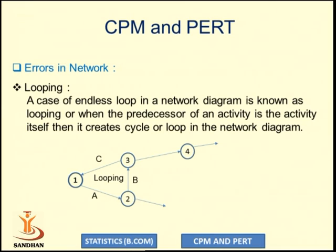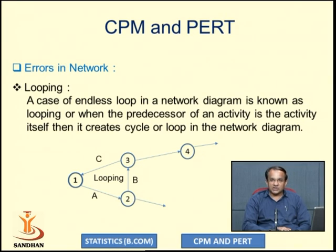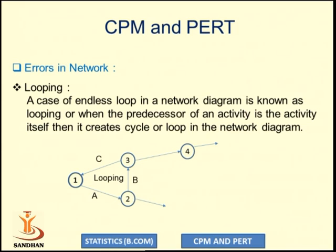While drawing a network diagram, two types of errors can occur. The first error is looping. Looping means a case of an endless loop in a network diagram, or when the predecessor of an activity is the activity itself, creating a cycle or loop. When looping occurs, the project cannot be completed, so looping is considered an error. As seen in the graph, activities A, B, and C form a loop where each activity is the predecessor of itself. To remove looping, we use a dummy activity.